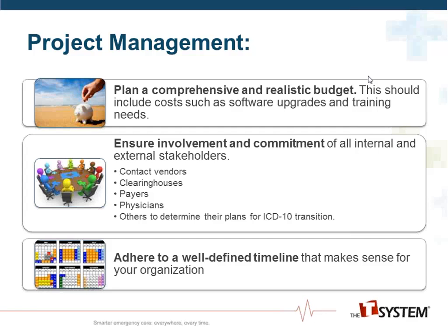Elements of your ICD-10 project include planning a comprehensive and realistic budget. For example, does your organization require system upgrades to accommodate the code set? Will any of the vendors with whom you do business be passing on their cost of implementation to you, the consumer? What is the cost of training individuals? This cost not only includes training, but any lost productivity due to time spent in training.